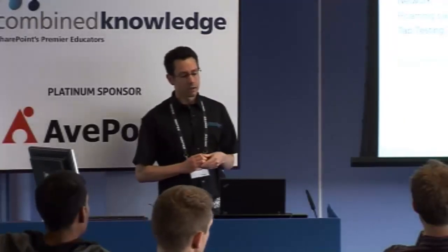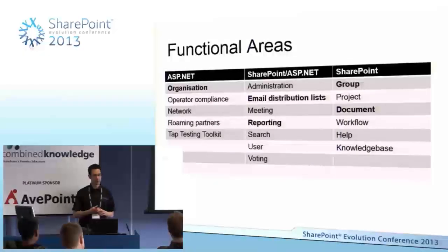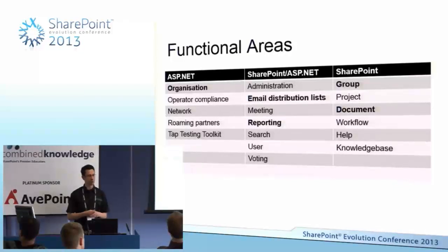When we finished writing the functional requirements for InfoCenter, over 400 different use cases had been created, and the use case document was over 300 pages thick. Like many sales proposals, the delivery team didn't know about the sales bid until a week before the process. So I spent a long weekend in the office with a colleague providing an estimate,